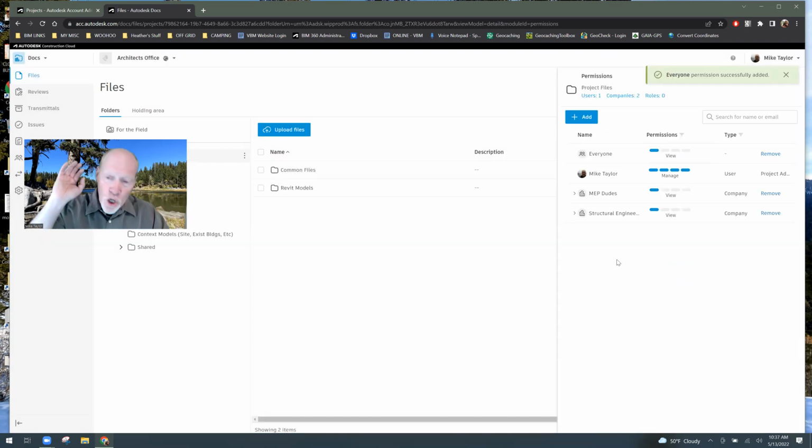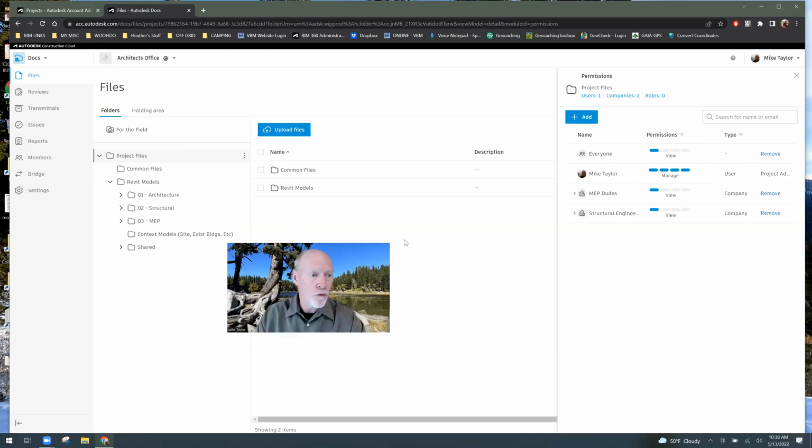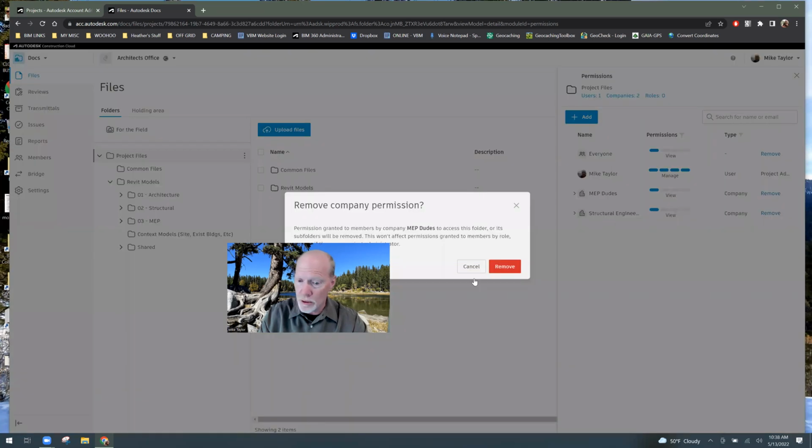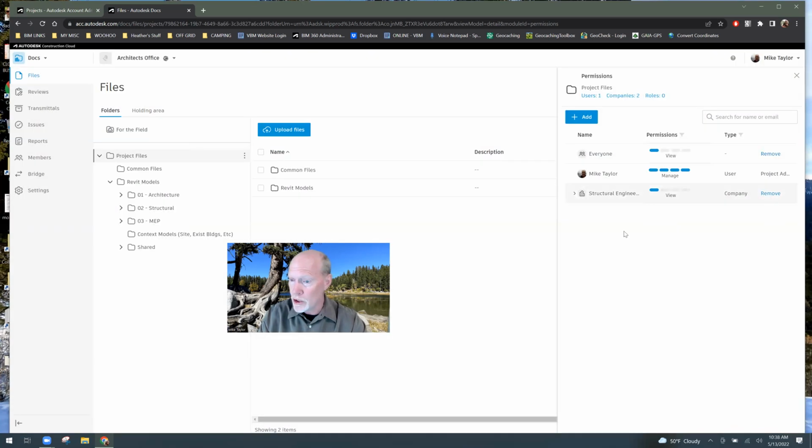So now, anybody that I add to the project, anybody that I invite, I don't have to come here and add their company any longer to have access to all these files below. So from project files level, I can get rid of MEP dudes, remove, structural engineers, remove. So now every single person that is ever added to this project, everyone has view and download to every one of the folders below project files, okay? Which is a great feature.